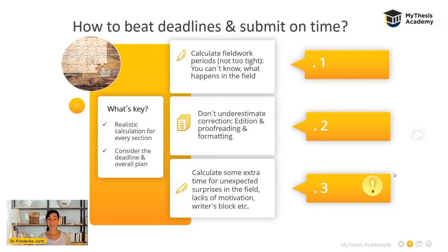And then as a third suggestion concerning the time buffers, I would suggest that you also calculate some extra time, let's say 2 weeks or something, for some unexpected surprises.